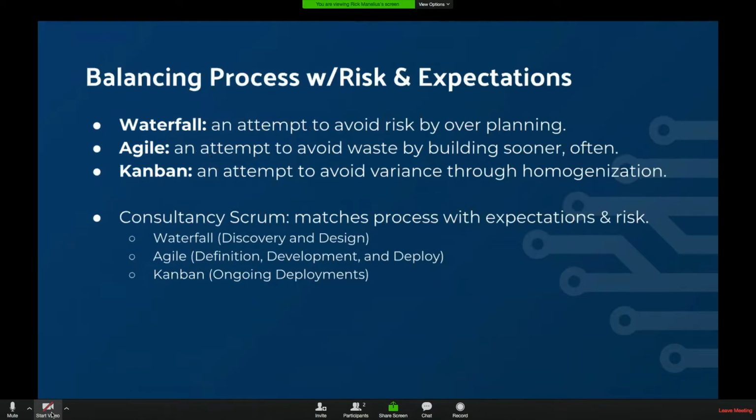But if you've done your homework and your due diligence in the waterfall approach and made sure you're on the proper levels of magnitude, you've significantly de-risked the situation. And then finally, when you get into support, meaning the project's already launched or the phase 1 launch, and you go more to support and maintenance, that's when a Kanban approach is really helpful, when you can start to size things as single tasks across multiple clients.